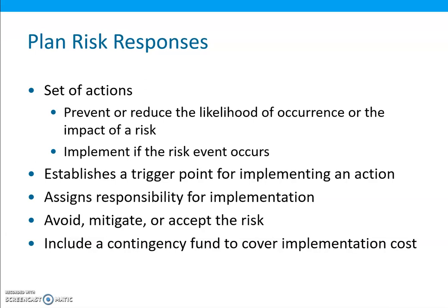Risk monitoring involves regularly reviewing the risk assessment matrix throughout the project. During the project, it is important to regularly monitor and evaluate all risks to determine if there are any changes to the likelihood of occurrence or the potential impact of any of the risks. These factors can determine if a particular risk has increased in priority or attention, or if the risk has diminished in importance. Furthermore, new risks may be identified that were not considered as risks earlier in the project but now need to be added to the risk assessment matrix.